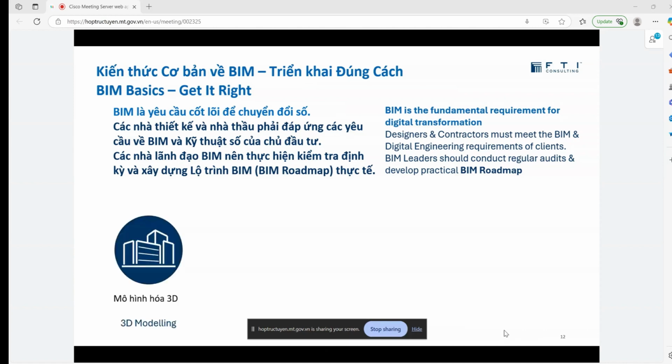The 3D modeling is going to be the most important at the beginning, making sure that all of the alignments are modeled, all the bridges are modeled, all the crossovers are modeled, and so on. Once the models are being developed, then it will be down to the engineers to do the coordination, just to make sure that everything is actually going to fit together, so that the pipework is fitting inside the structures, the railway systems are going to fit in the viaducts, and so on and so forth.